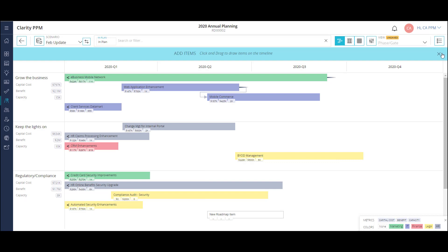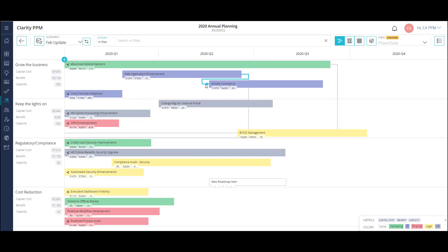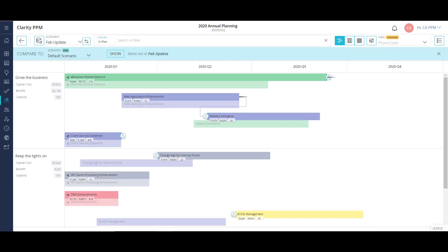I can drag any of the projects across the timeline to help structure the overall schedule. I can also add dependencies between projects. Scenario planning is also a useful tool in roadmaps. I can create scenarios as we move throughout the year using up-to-date information from my projects and compare them with the original roadmap created during planning. This allows me to view changes to schedules and target metrics on my projects.